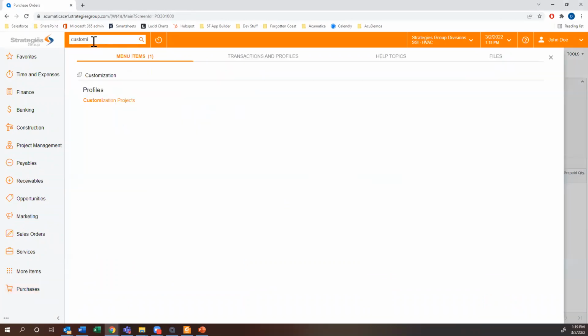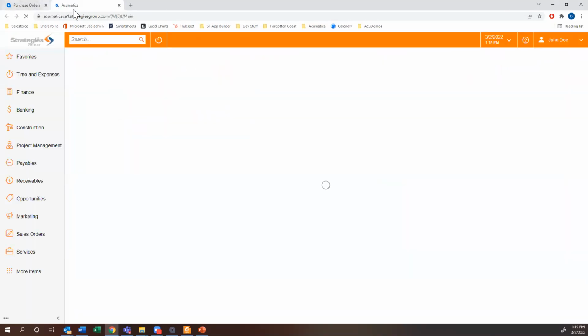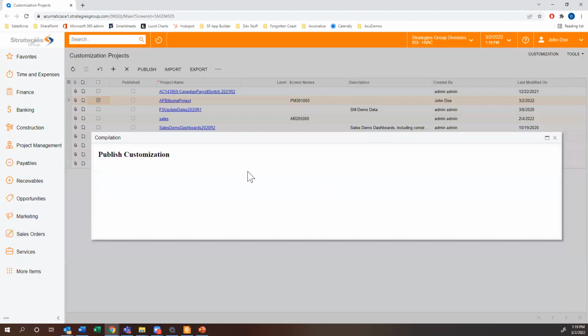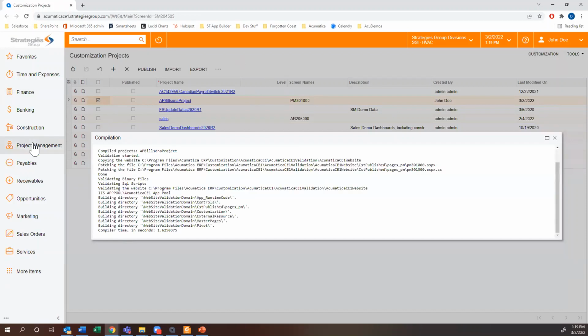You're going to see that new drop ship button available there. You're going to see all of those different features to go from the project screen, it'll take you right to the purchase order screen where it'll pull in your project information and you can finish it up from there. You can add your vendor, add the details of the PO, your inventory ID, whatever is needed.